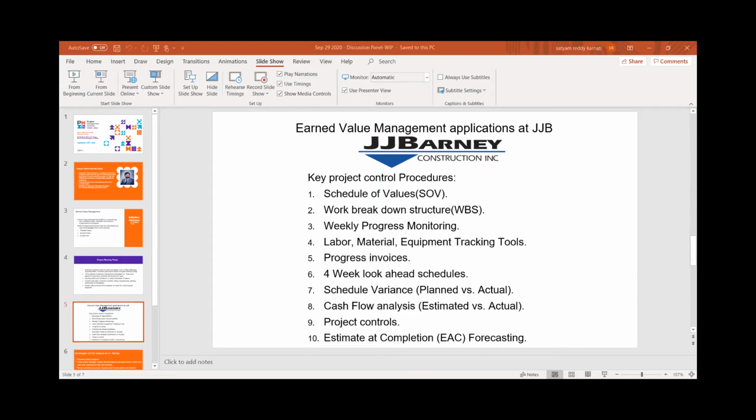Then I have excavation and backfilling, perimeter grade beam, flat work and associated activities, and site work and all the associated activities and changes. This is according to our work breakdown structure based on our initial discussions, and this is what we furnish and use to do our monthly billing also.